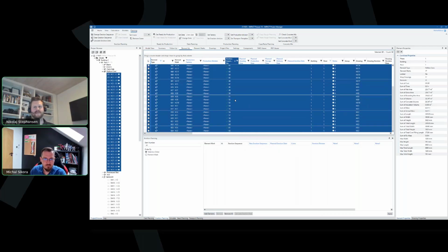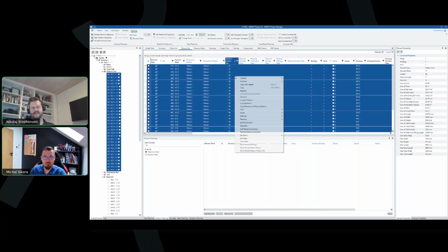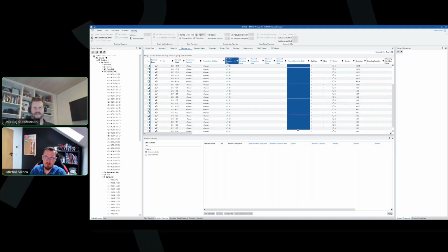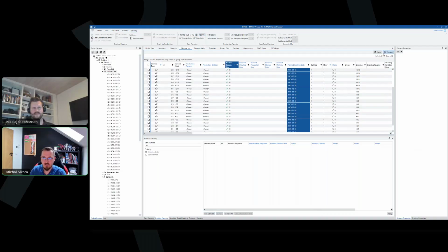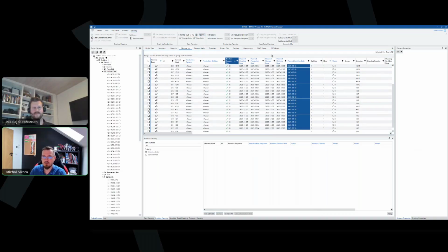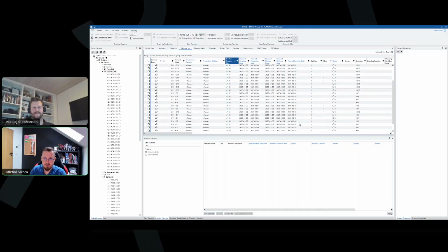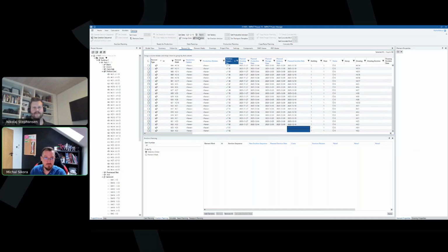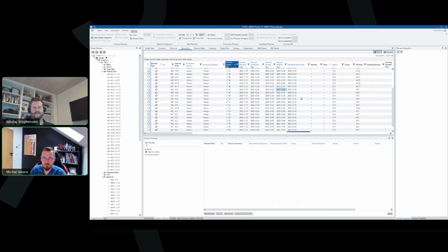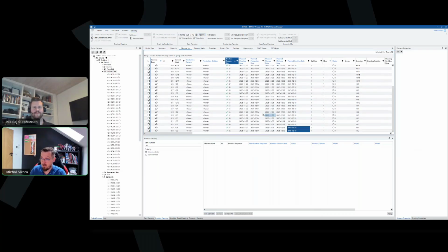Okay. That's weird. Right click it and try to do it in the old-fashioned way with the planning, so that the guys can see. Just for you to see the difference between those two little different setups. The old-fashioned way, let's just select the date, first week, middle of the second week of December, apply that. Once I click save, Impact will actually automatically set the dates for other elements. Just those two days that I forgot to mark them up, and that's it. Impact calculates that for you.